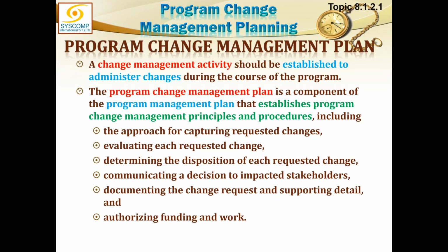This establishes the program change management principles and procedures, which may include the approach to capturing requested changes, evaluating each requested change, determining the disposition of each requested change, communicating a decision to the impacted stakeholders, documenting the change request and supporting details, and authorizing funding and work.